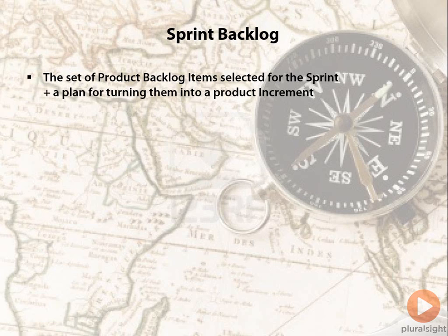One of the characteristics of a sprint backlog is that it must be able to show remaining work in the sprint. Now, this is a uniquely Scrum-ish type metric. Scrum does not look at how much time has been spent working on anything. We only are interested in valuing working software as the measure of success.